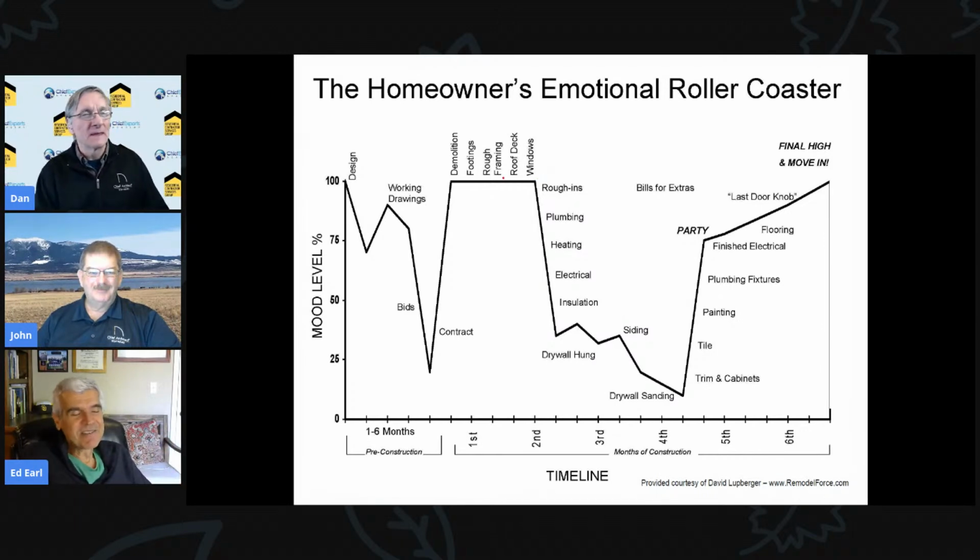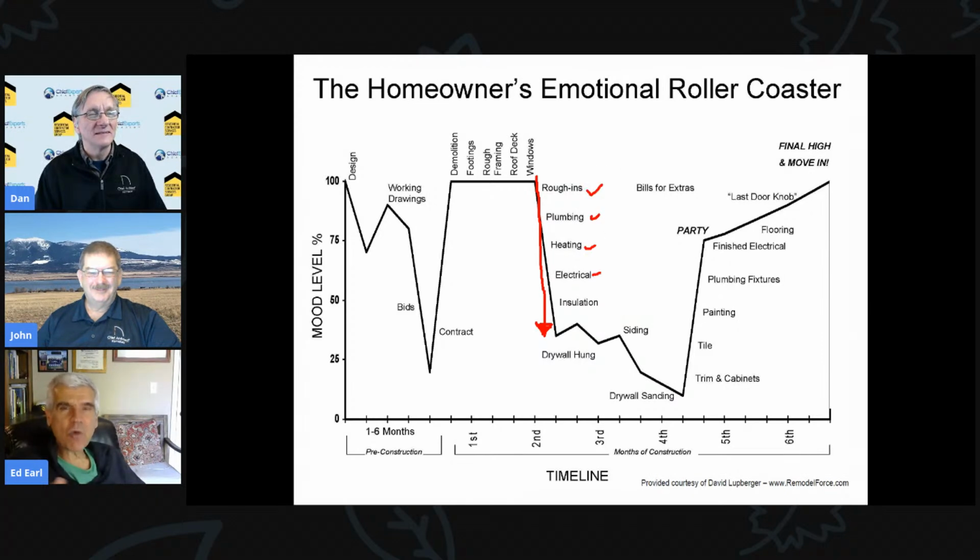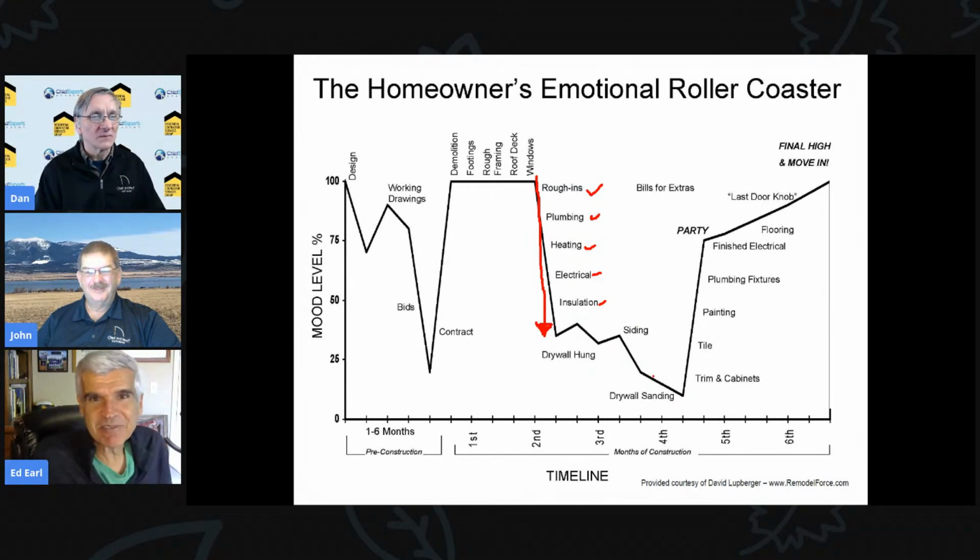And I'm like, no, you know what? I pulled this chart out. I said, we're right here. Right, exactly. We're right there. I said, now we're going to start this process called rough-in. During rough-in is when we put all the stuff inside the walls, wires and your plumbing and pipes and the mechanical. And it's going to seem like weeks where nothing's going to happen. You're going to show up and go, wait a second, it looks the same as it did last week when I was here.